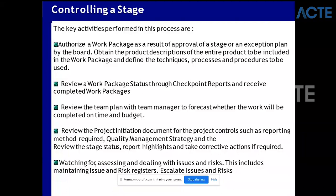Controlling a Stage starts after initiation and what you will do is create something called a work package - a work package is what has to be delivered in that particular stage. You will ask the team to pick up the work package and deliver it. You will have a team plan with the team manager, forecasting whether the work will be completed on time. Basically, before you start development you will do a control of a stage so that you know your products are getting delivered as required. It's more like governance on top of any delivery or development that happens.